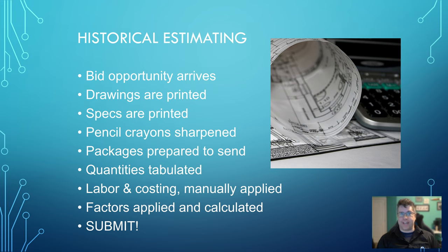And then the specs have to be printed out. Sharpen up your pencil crayons and start to do the takeoff. Packages have to be prepped and gotten out. Again, back in the day this used to be a fax situation. These days it's still more email, but you still have to pull apart the specs, assemble it into its individual components, and then get that out to the suppliers.